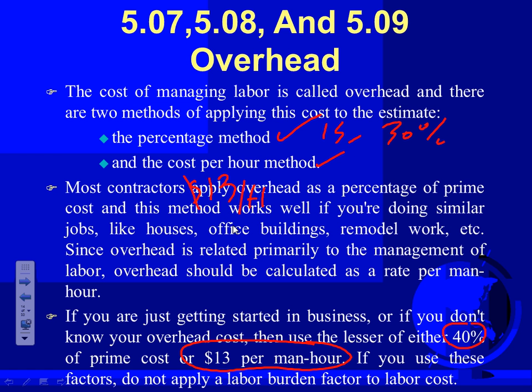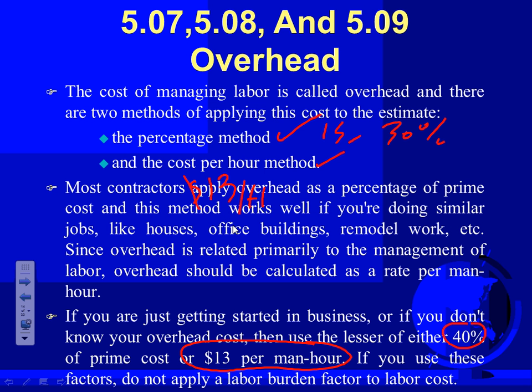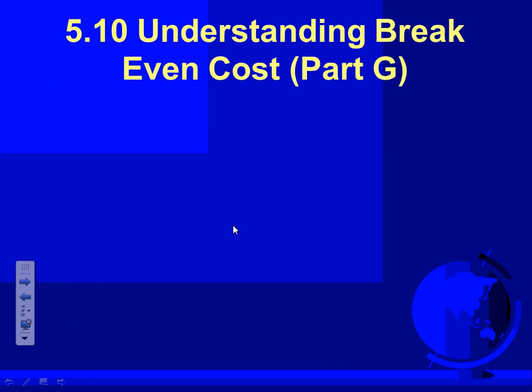So if you only stay in business, if you paid $100 for your employees, they have to bring in $200. $100 will be paid for them, and the other $100 will pay your overhead, because there's electricity and water and all this good stuff, right? And your profit too. So that's like doubling it basically. And that would equal almost the same thing as adding the profit and overhead.